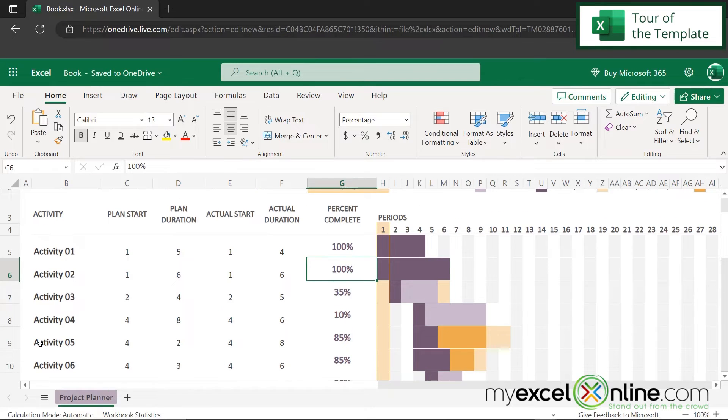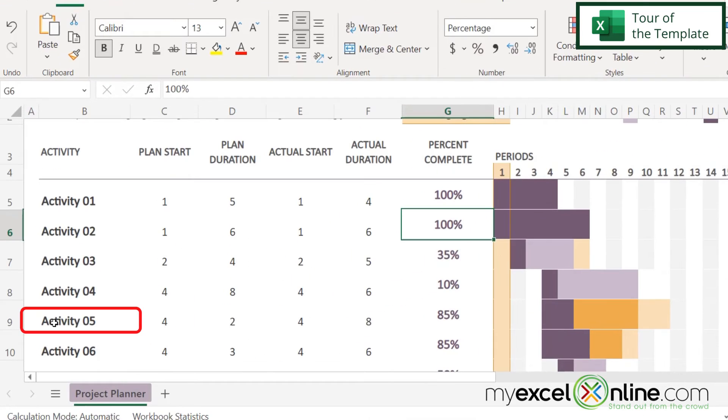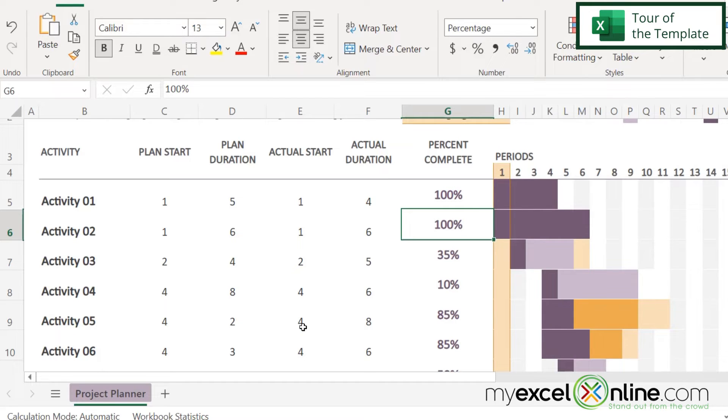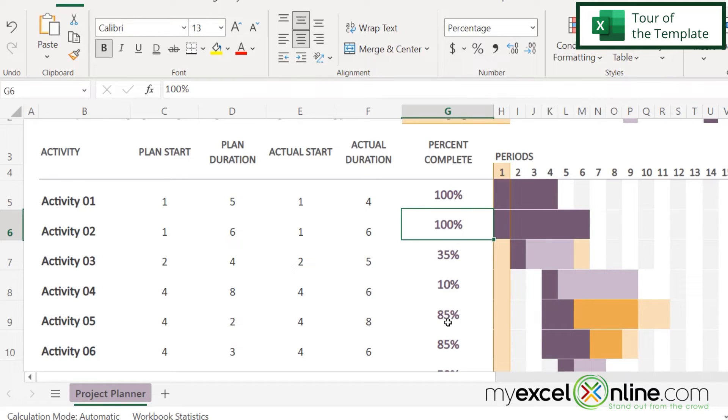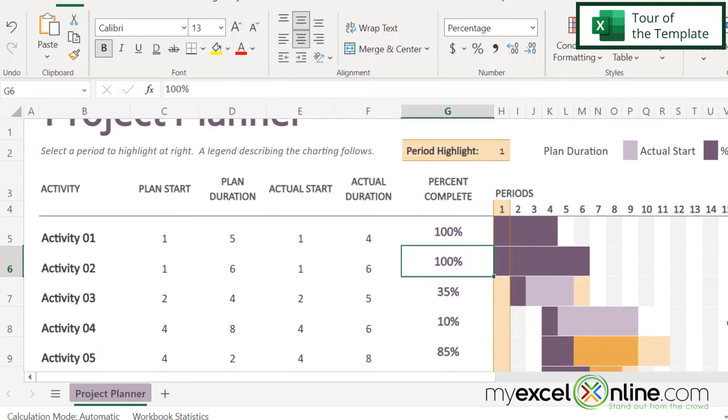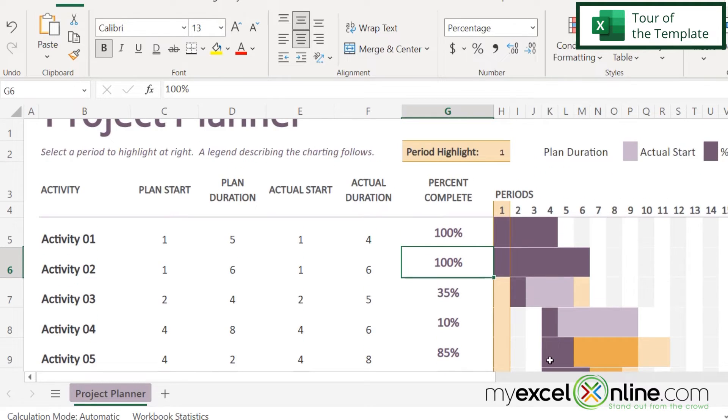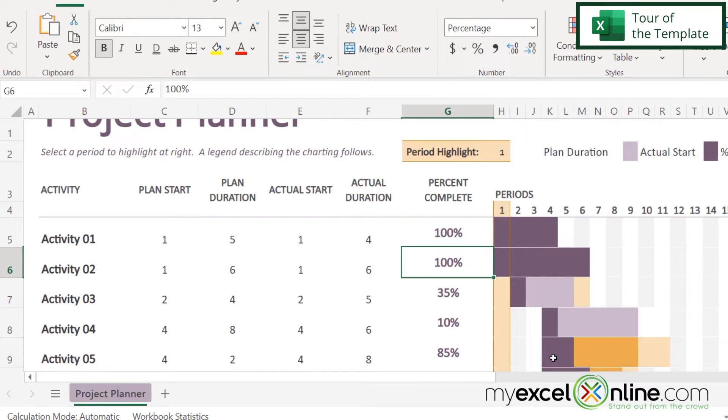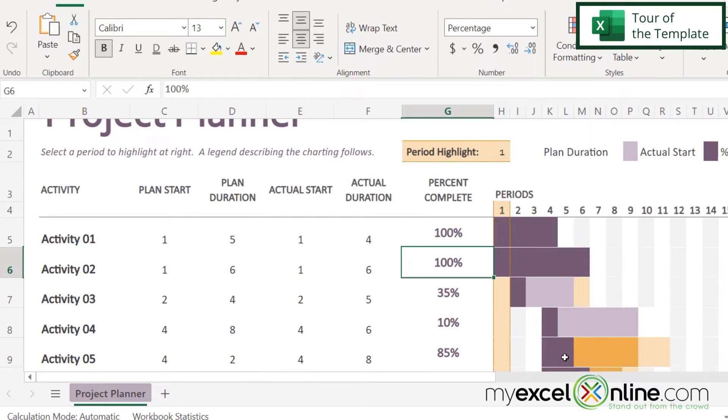Now let's look at activity five over here. I plan to start it on the same time period. I thought it was going to take two days, but it actually took eight. And I have this at an 85% complete. So let's see what these color codes mean up here. So I can see that of these eight time periods that I have color coded right here, two of them being these two days right here that I had planned on are my percent complete.